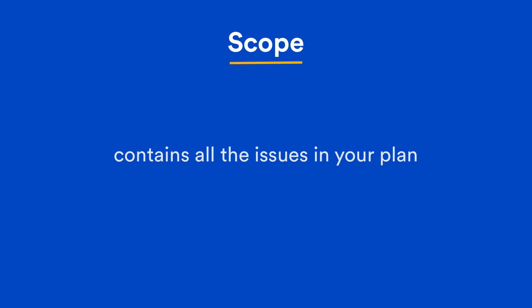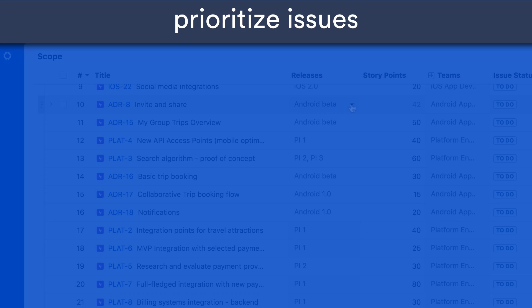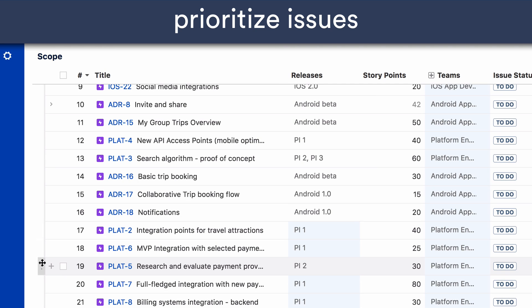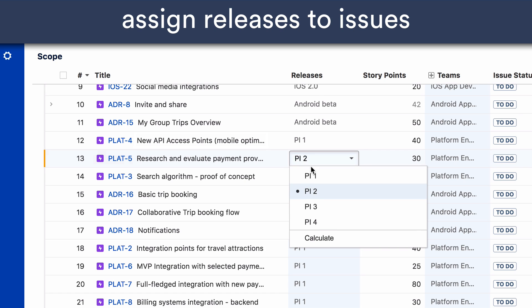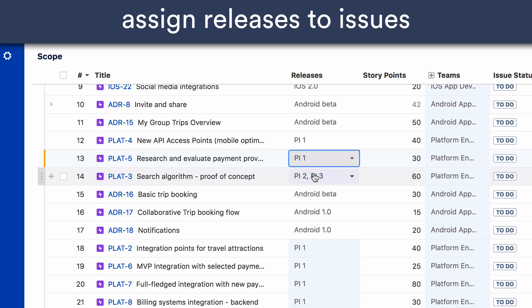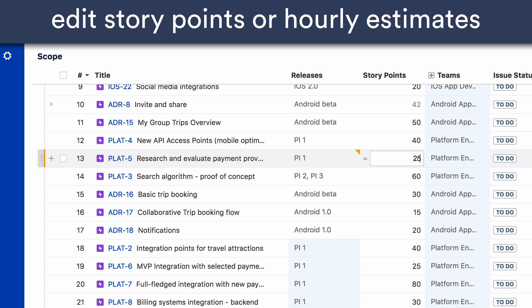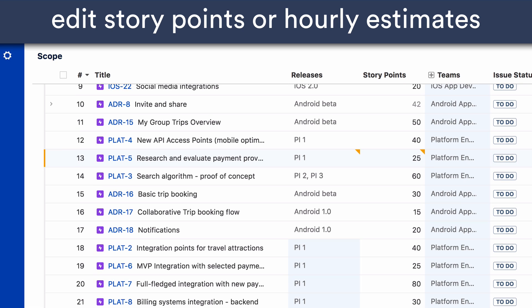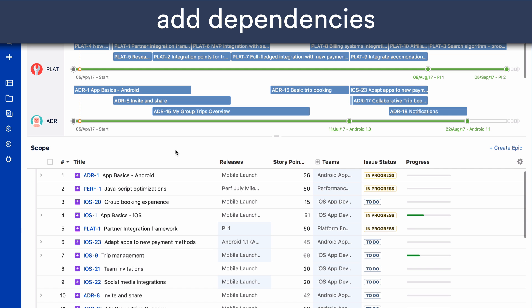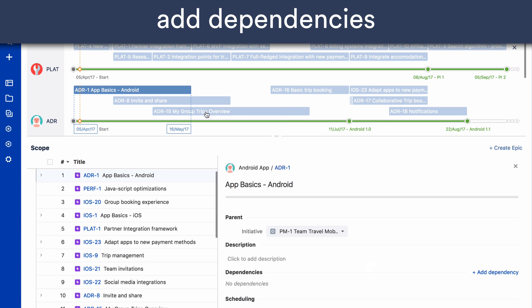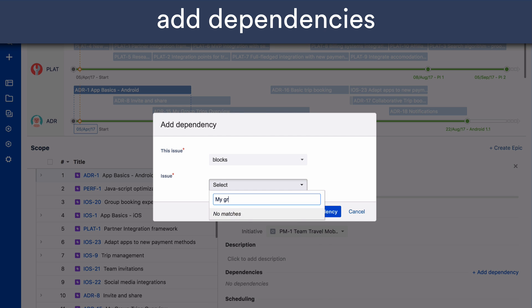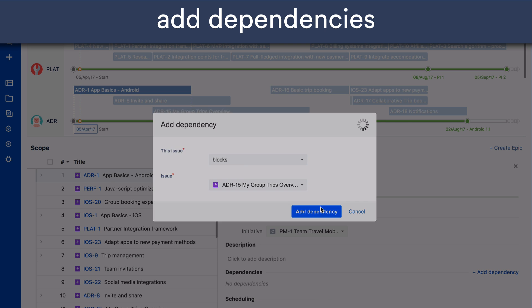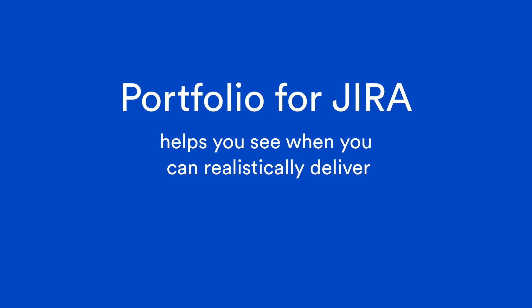The Scope section consists of all the Jira issues that you want to work on in your plan. You can prioritise issues that get scheduled first, assign issues to different releases to increase or decrease scope, edit story points or hourly estimations to size work items, and add dependencies to issues to manage blockers.